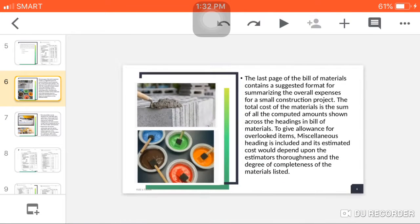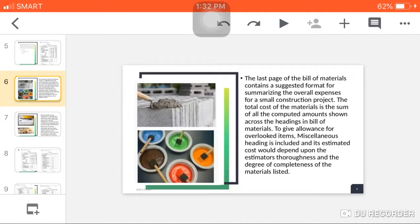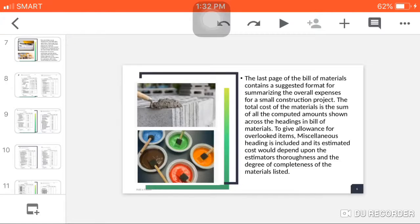The last page of the bill of materials contains a suggested format for summarizing the overall expenses for a small construction project. The total cost of the materials is the sum of all the computed amounts shown across the headings in bill of materials to give allowance for overlooked items. A miscellaneous heading is included, and its estimated cost will depend upon the estimator's thoroughness and the degree of completeness of the materials listed.